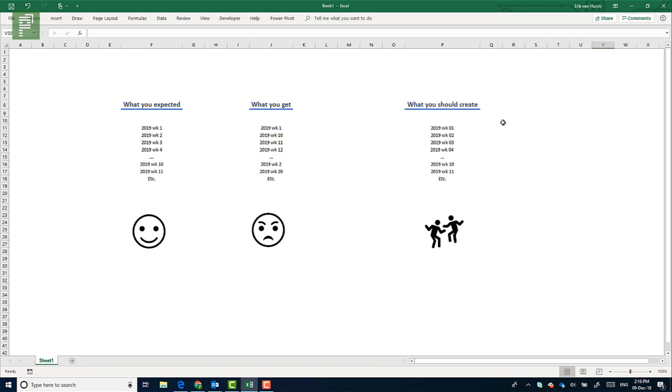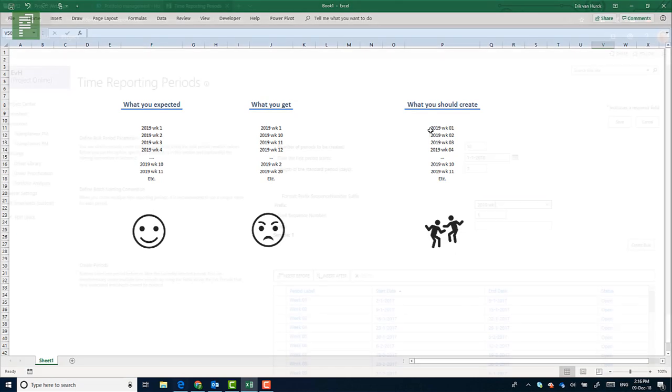So what we actually should create is a situation where the first nine numbers are preceded by a zero, and then creating the other report periods just without the zero. That will create 52 time periods that are easily managed within reports.